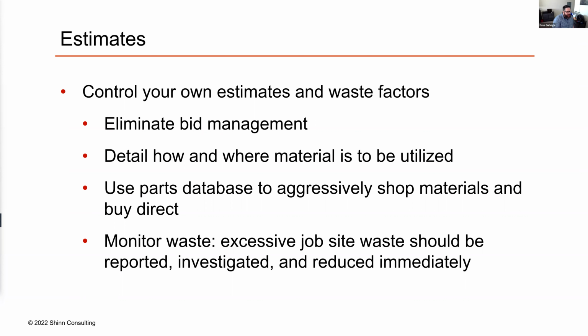A great way to do that is if your superintendent's doing inspections on the job site every day, I want to ask him, on top of telling me, did they frame it right? Did they do this right? I want to know what my waste looks like for every cost code, so that I can track what am I still having in waste that I can become more aggressive on.